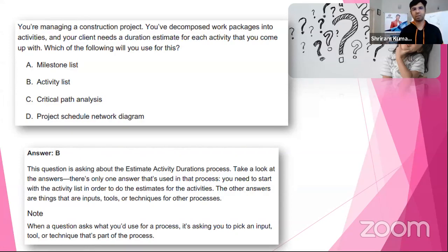Now, the point is WBS. In WBS, the last stage is the work package. In schedule management, we take a work package and divide it into pieces, and those are called activities. Those activities come under the activity list. In any work, we have granular level work to be done. The granular level work could be an activity, or further down a task which makes it happen. That's how it works. Let's go a little more into this subject.